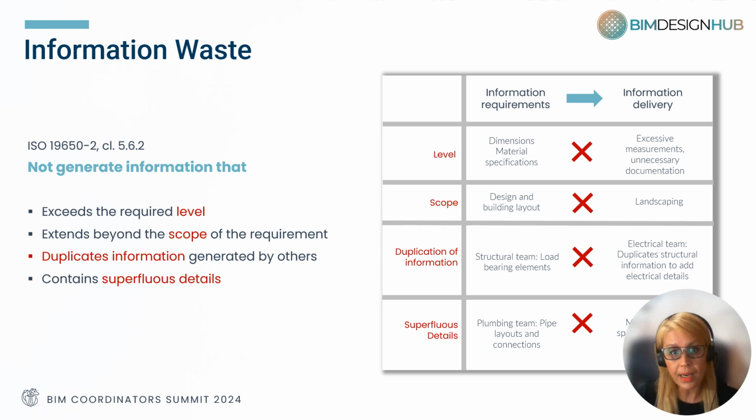Additionally, if the structural team generates detailed plans and specifications about load-bearing elements, then the electrical team should not duplicate the structural elements to add electrical information. If the plumbing team is responsible for providing documentation about the pipe layouts and connections, then providing detailed manufacturing specifications of the pipes could be considered superfluous details.